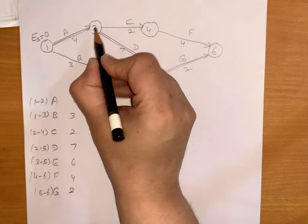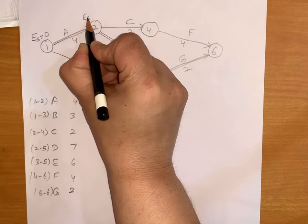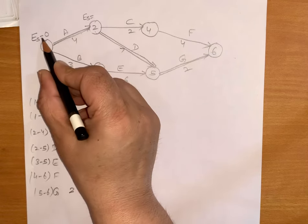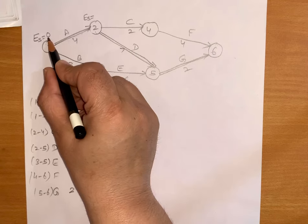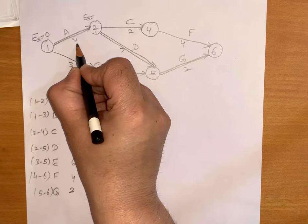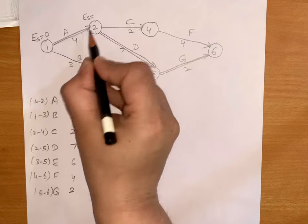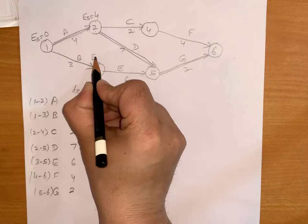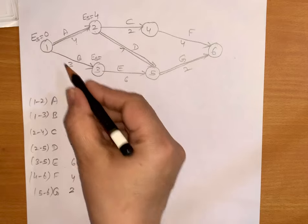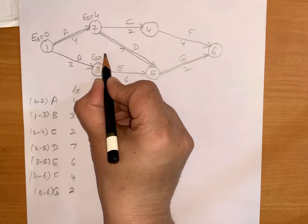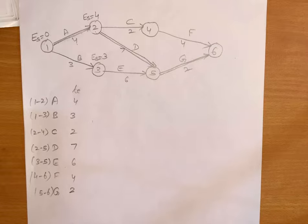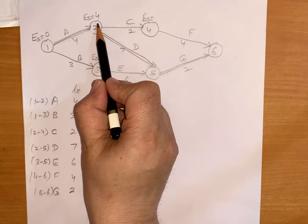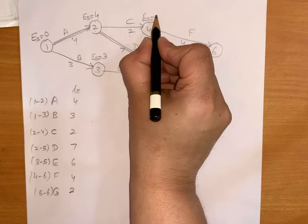For event number 2, earliest start will be the earliest start of the first event, that is 0, plus the expected time for that activity — 0 plus 4 equals 4. Now for the third event, earliest start will be 0 plus 3, which is 3. Similarly for event 4, earliest start will be 4 plus 2, which is 6.